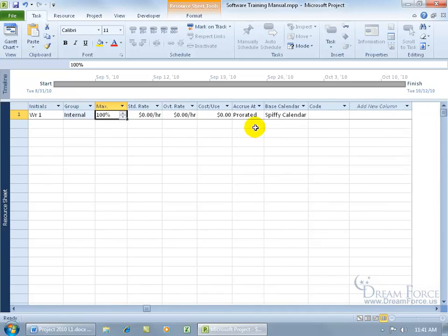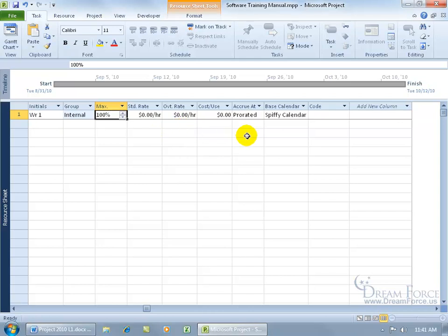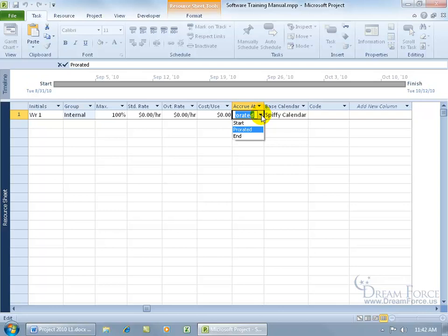Then you have accrual, which tells project when to calculate which costs, either standard rate, regular, or overtime, will be calculated for a resource. It's either going to be prorated, or you can see the other options at the start or the end of the task, and prorated is as the task is completed. And that's the default. Let me go ahead and click off.